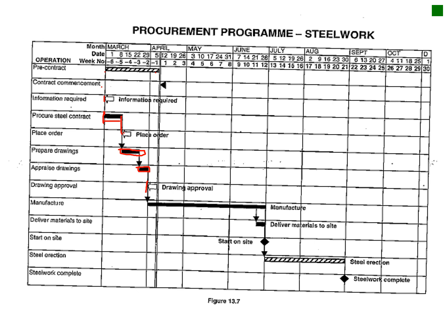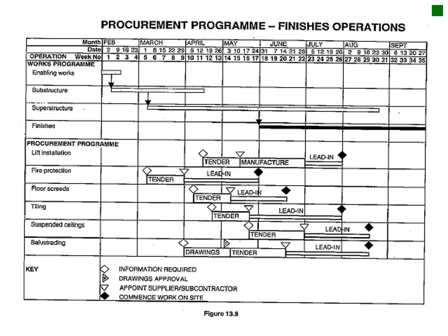Okay, and then you've got a manufacturing time which starts here, and the previous one, that commencement was actually this date when it had to commence, but that was for the manufacturing. The actual erection only starts here, so start on site. So you see there's your stage gate, you have your delivery time there, and then you've got your actual steel erection there and steel completion there. Okay, so very straightforward procurement program.